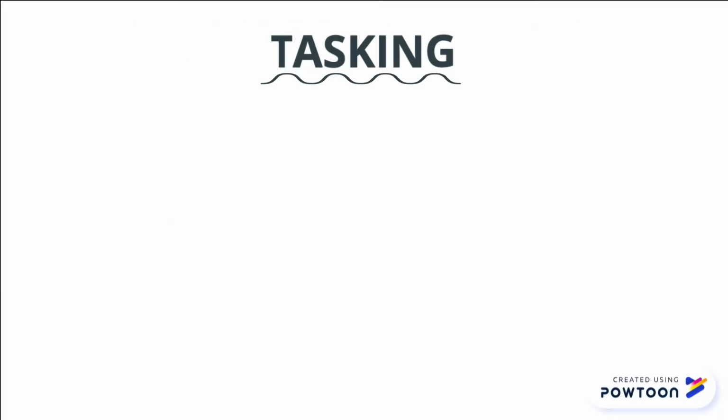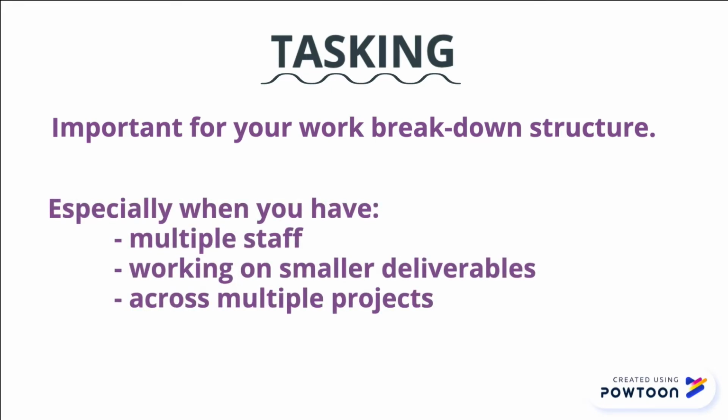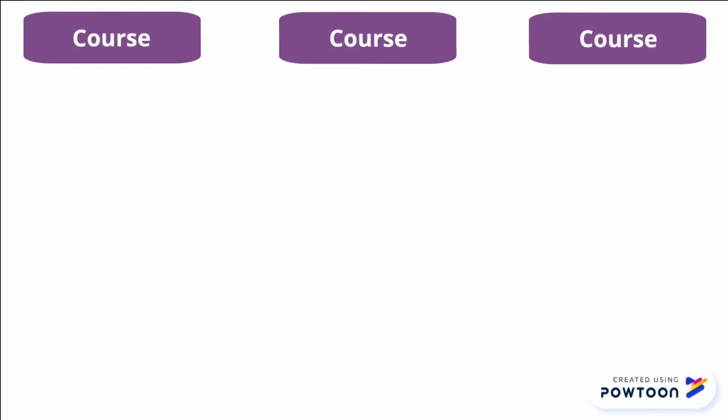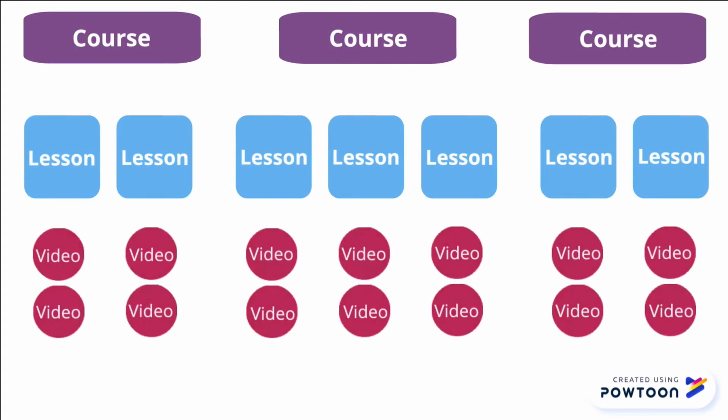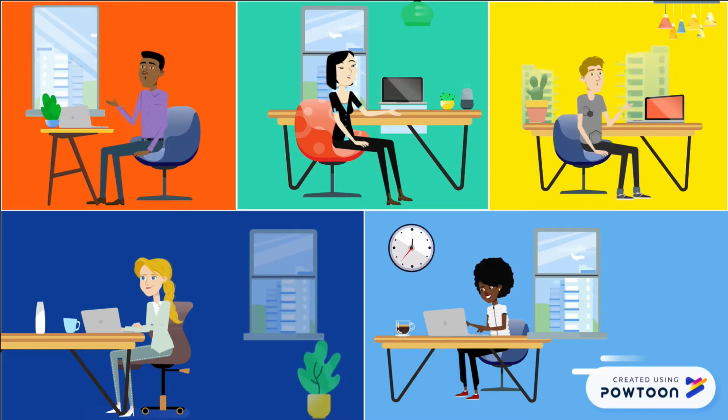Tasking applications are more common within e-learning scenarios and are particularly related to your work breakdown structure. They are valuable when you have multiple staff working on smaller deliverables across multiple projects. For example, imagine you are developing a number of courses, each with multiple lessons that contain short instructional videos, and you have hired a number of video editors to complete these tasks.